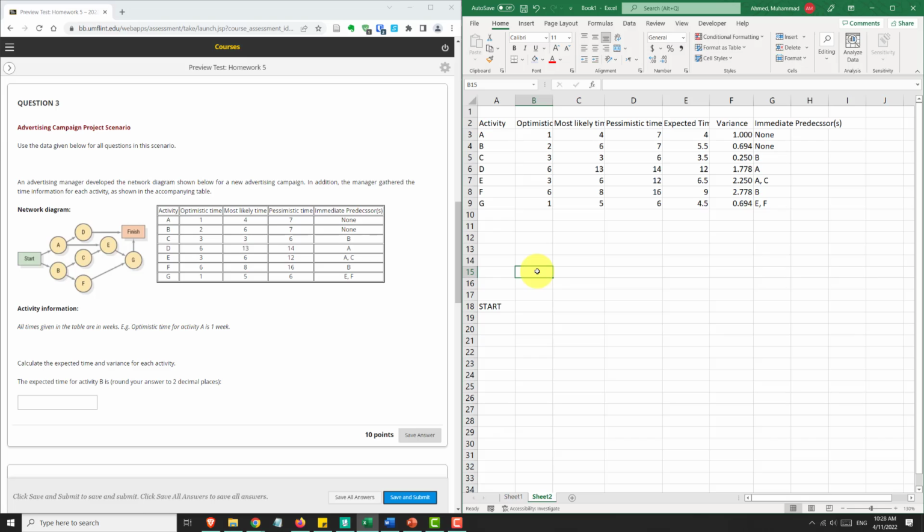So let's put A here, which takes we have the duration up here, so I'm not going to write the duration here. And then let's put B here. Okay, these two activities have no predecessors, so you can start the project off with them. As soon as the project starts, we can move to start these activities. Then D depends on A, so we can put D here.